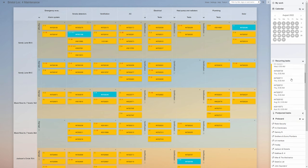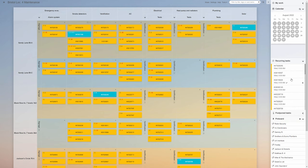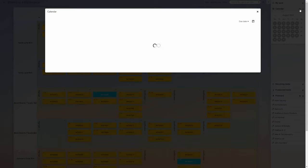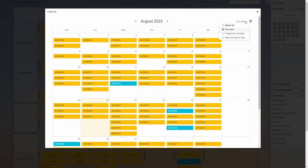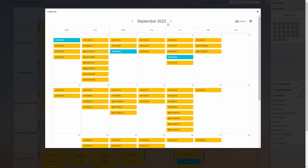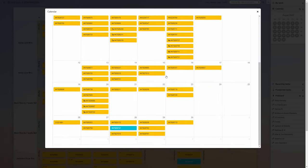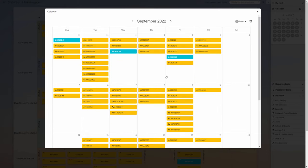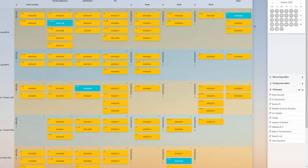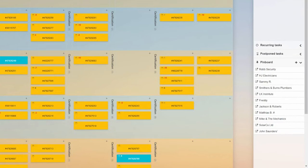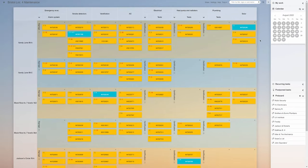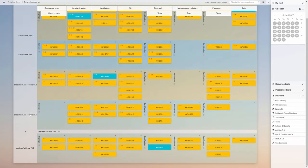Replacing a flow with static jobs makes it possible to quickly filter when each building or its part needs work, so that arrangements with the apartment owners are made well ahead of time. Information on contracted technicians involved in some of the jobs is available from the pin board.